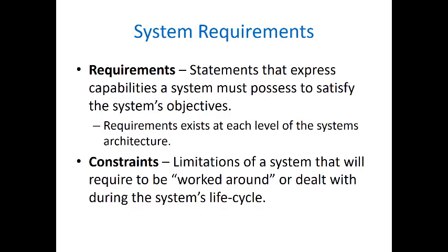So similar to conceptual design, the very first thing that we are going to focus on during the preliminary design phase is trying to get a very good understanding of the requirements of customer, voice of the customer, expectations from the system, what are the objectives of the system. We also try to get a good understanding of the constraints that we may face. By constraints, I mean the limitations that may prevent you from creating the system that you are planning to create. And if there are such constraints, for example, budget limitation, time limitation, technology limitations, is there any way to work around those constraints?